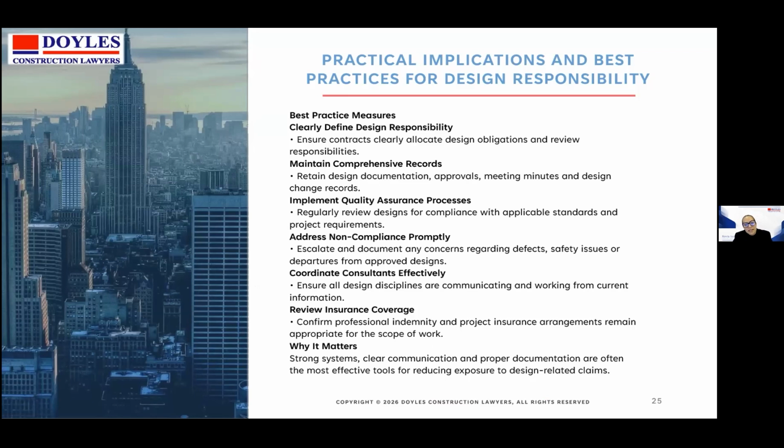So the practical implications and best practices for design responsibility. Clearly define design responsibility in your contracts. Maintain comprehensive records. Retain design documentation. Implement quality assurance processes. Coordinate consultants effectively and review insurance coverage. So that's the toolkit. Define responsibility in your contracts, keep records, run QA, review your insurance.